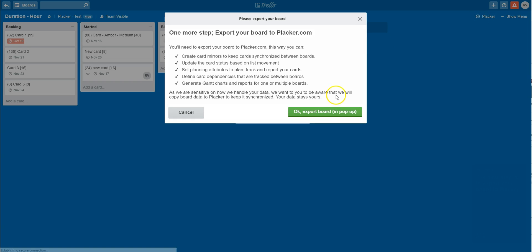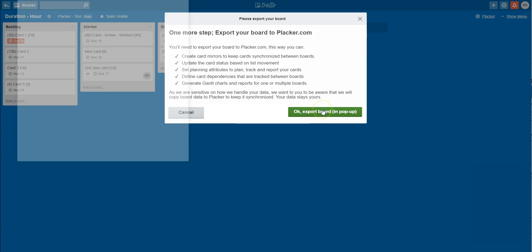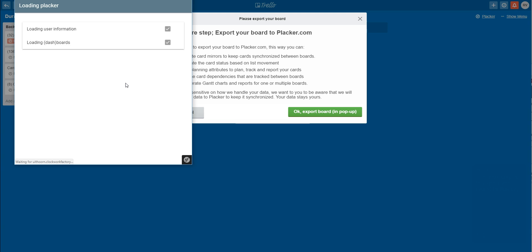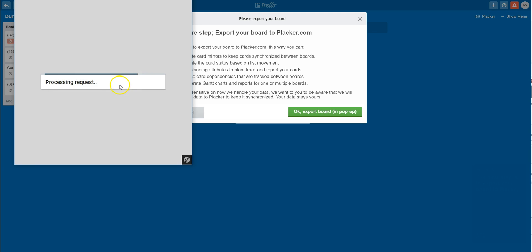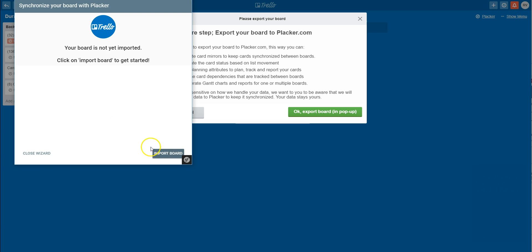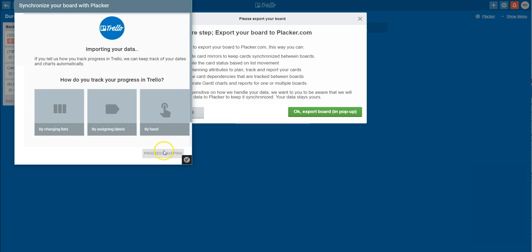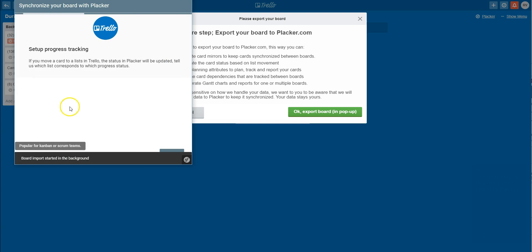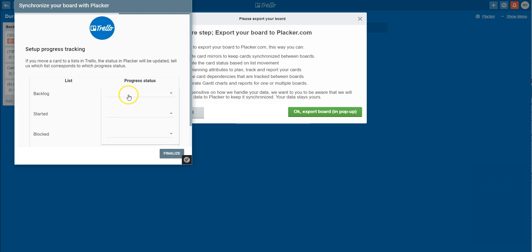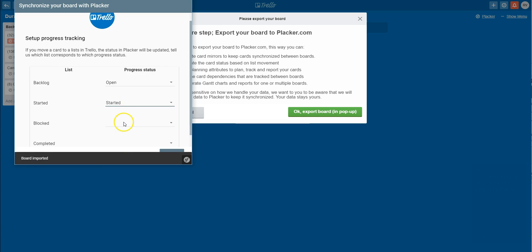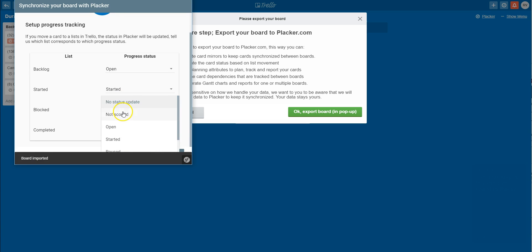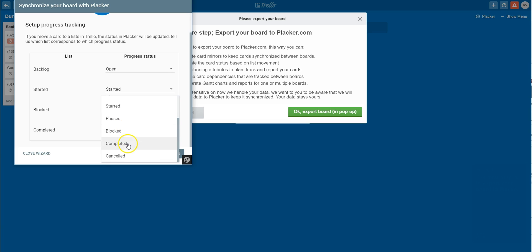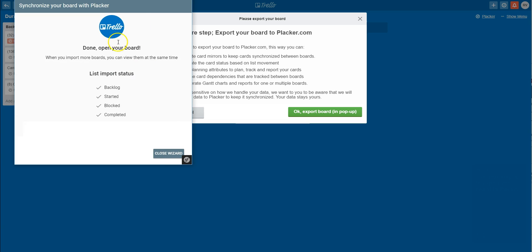The next step for me is to export my data into Plekker. In this process, I am also setting up how my cards move from open to completed on my board. In my case, I move them from one list to another. Plekker uses this information to automatically log the actual start and end date to each of my cards and to calculate the time spent on each card.